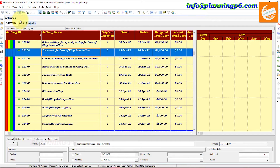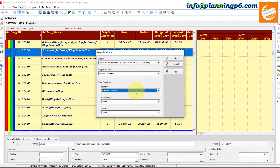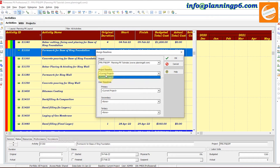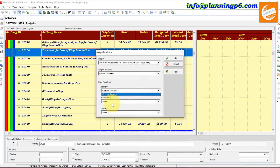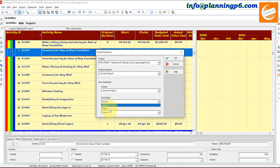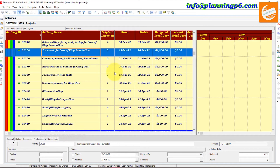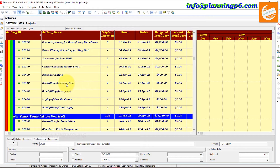The very first step is to go to Project and then go to Assign Baseline. In the baseline settings, remove the baseline from the project. If the primary baseline is assigned, set it to None. If another baseline is assigned, also set that to None for the current project. After removing the baseline, you can proceed to delete activities.